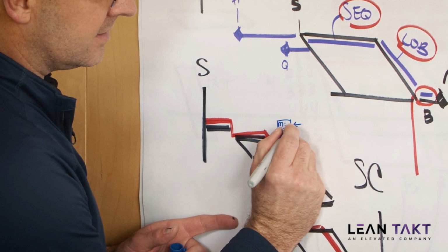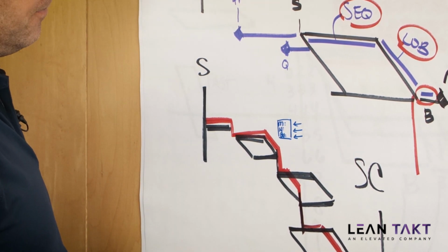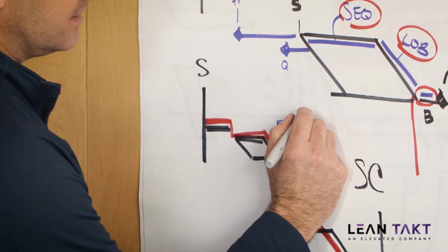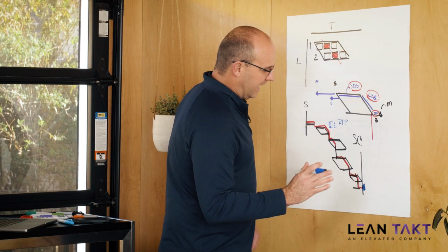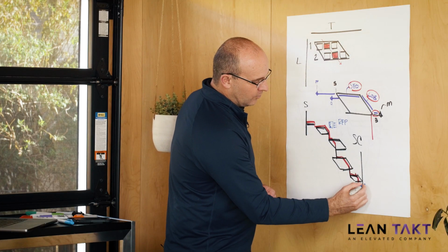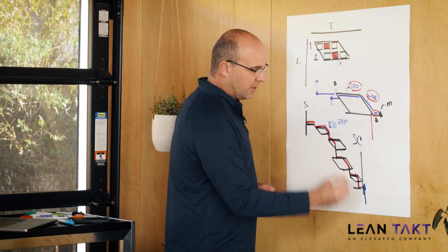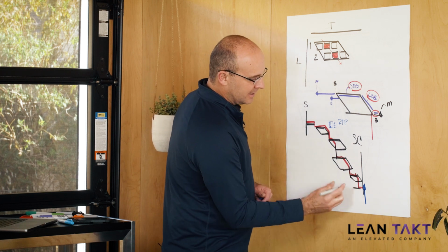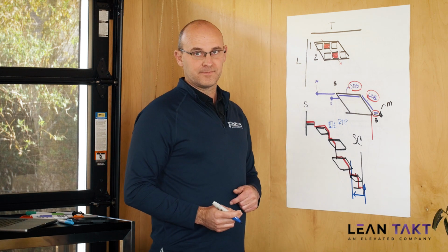And I want it to say, what is your zone strategy and your takt time? And what is your overall duration? And what is your realized, and I'll just write realized flow potential. That way, in the macro level takt plan, I can see what is our base promised, our slowest possible competitive fair speed, and based on these tables, how much farther do we think we can pull it in?